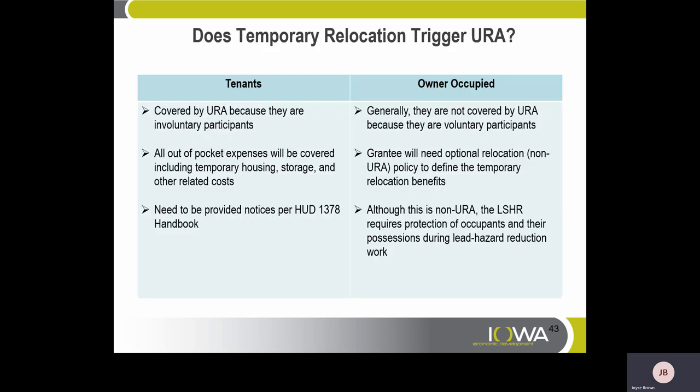Does temporary relocation trigger URA? Tenants are covered by URA because they are involuntarily participating. All out-of-pocket expenses will be covered, including temporary housing, storage, and other related costs. Need to provide notices per HUD's 1378 handbook. Owner-occupied residents are generally not covered by URA because they are voluntarily participating. Grantees will need an optional relocation, non-URA policy to define temporary relocation benefits. Although non-URA, the LSHR requires protection of occupants and their possessions during lead hazard reduction work.